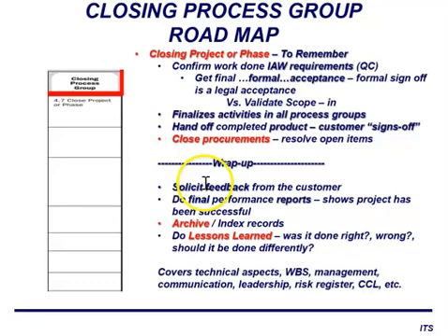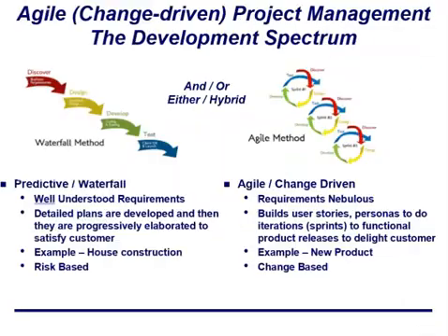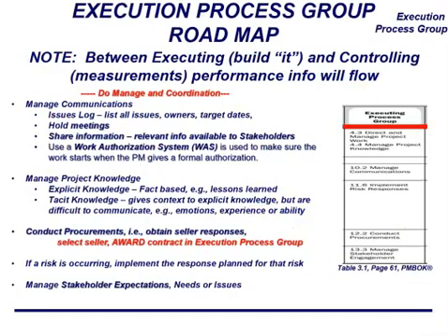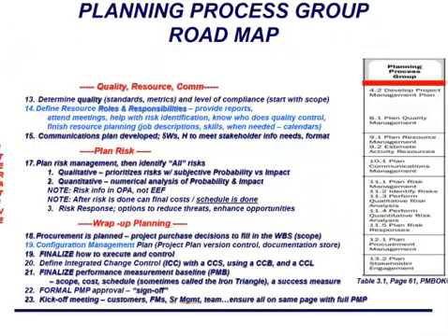Get feedback from the team, from the customer, from your bosses. Finalize your reports. Make sure you archive them in a place that others can use them, and do lessons learned. You've been collecting lessons learned throughout your project. Now you will be filing them in a single location. Okay, that's it. The focus was on execution, but to talk about execution, we really have to talk about initiating, planning, and controlling as well.